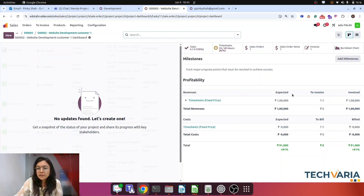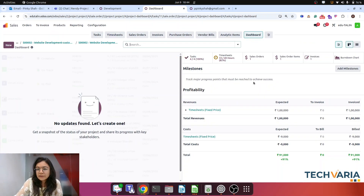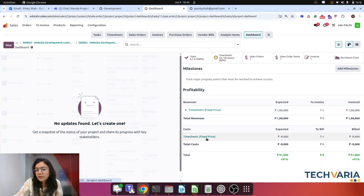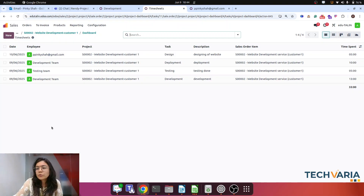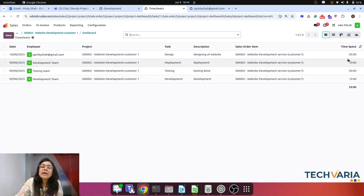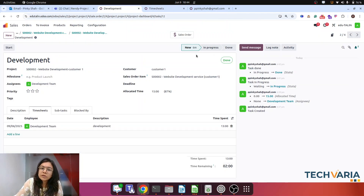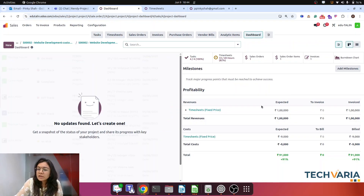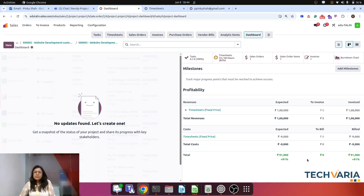Going to the project dashboard, you can see the actual cost behind the timesheets is 9,000. All timesheet entries are recorded: 5 hours for design, 13 hours for development, 5 hours for testing, and 10 hours for deployment. Each is multiplied by the employee's hourly cost, giving a total timesheet cost of 9,000. Our revenue is one lakh and total cost so far is 9,000.